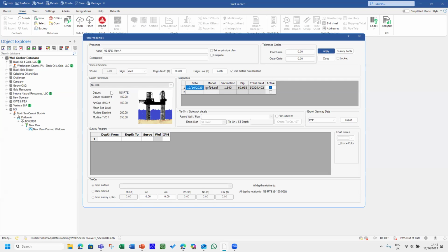For example, if you're drilling a well and the rig has to go away and come back later. For example, in the first round, they want to drill only the top hole, and after 1 year or so, the other rig will come and drill the deeper sections. Then you have so many rigs for the same well. It's very common actually in the onshore business, onshore drilling. There will be a very cheap onshore rig that will come, drill the top holes and leave. Very cheap because the cost is low.